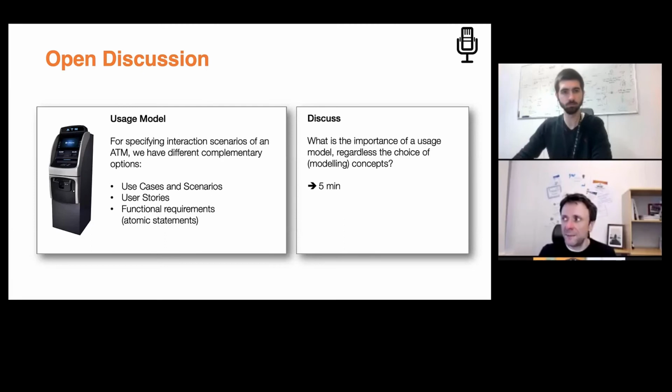Other purposes that come to my mind, more obvious purposes, is once I have understood my usage model, the key functions, key features that I want to provide with my software system, I can, from a planning perspective, do effort estimations. If you consider the general project organization and management of a software development project, the effort estimation is something I tend to do based on an activity-based notion. Use case points is one such example of an approach for effort estimation.